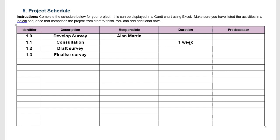Once we've received all the information we can then go about drafting a survey that suits the needs of the organization and our project. Let's say that will take us two weeks. Once it goes through a review round, little modifications are done, we can finalize a survey ready to be implemented. Let's say that takes one more week.